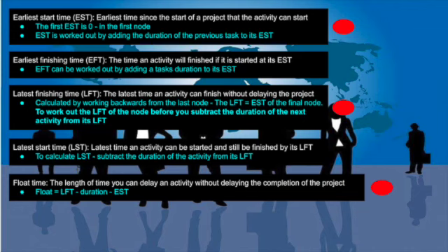And now you've got your latest start time, which you don't really need, but it's the latest time an activity can be started and still be finished by its LFT. To calculate the LST, you subtract the duration of the activity from the LFT.